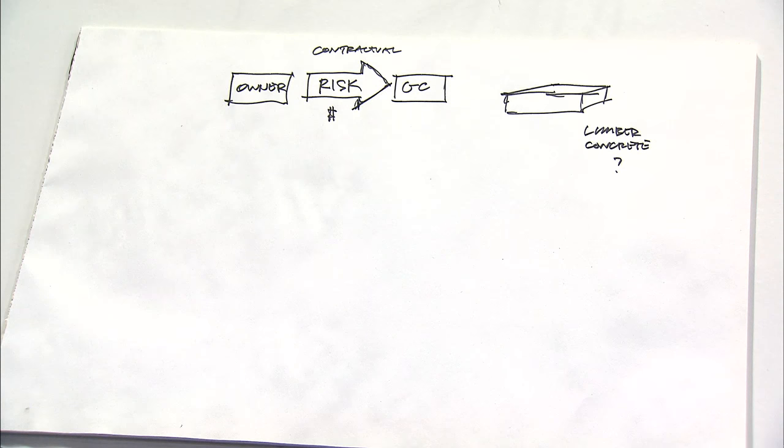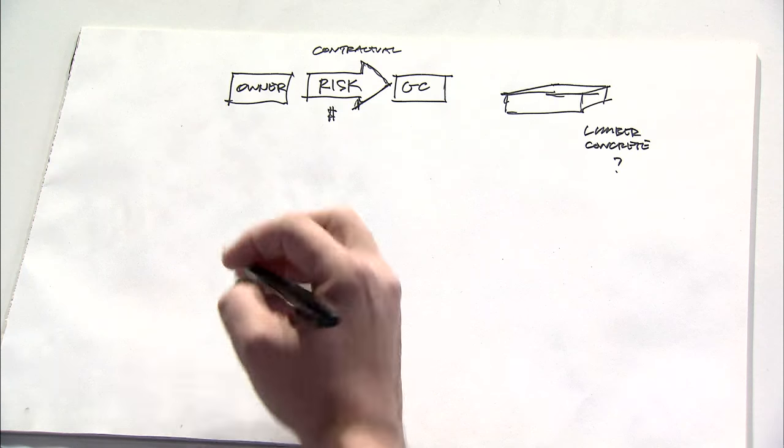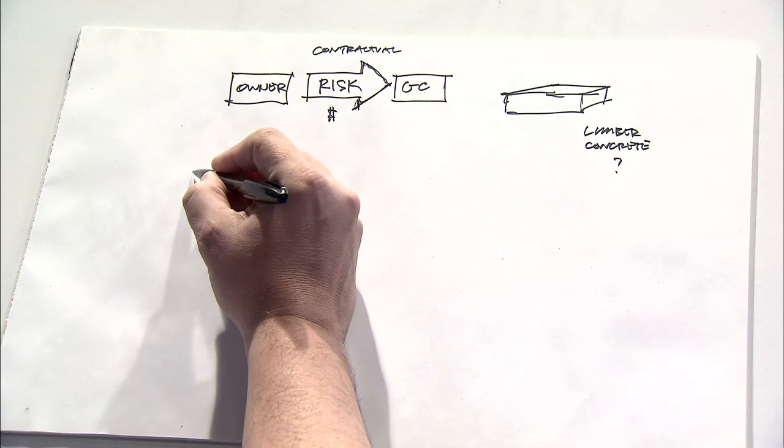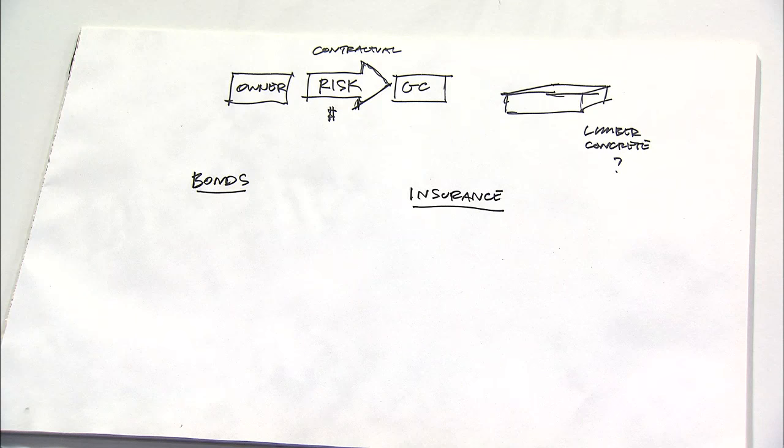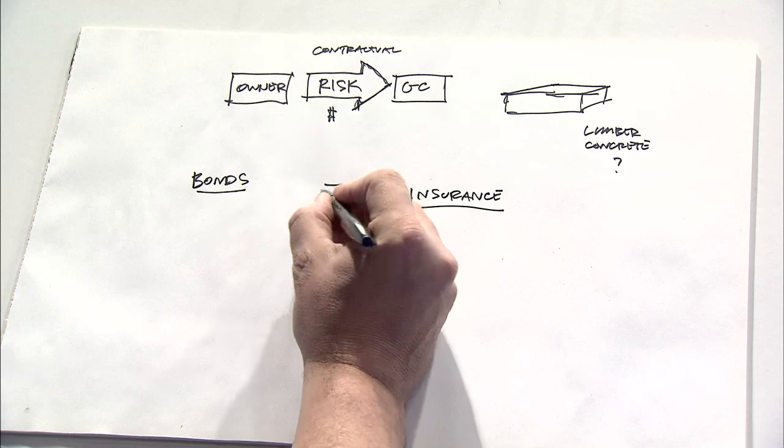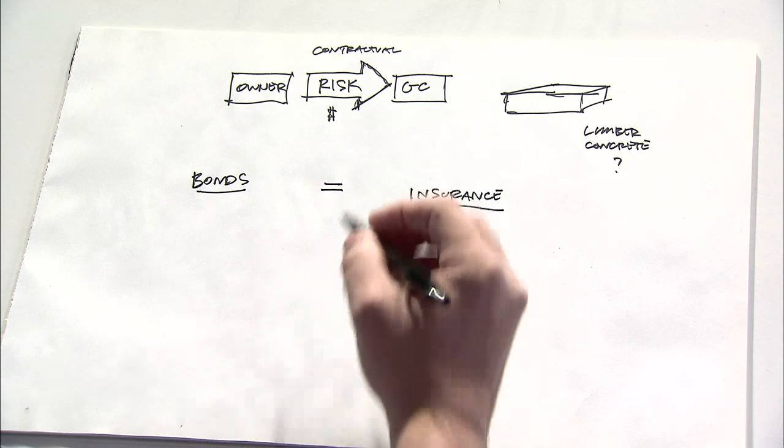And within all this transfer of risk, there are things that parties do to mitigate that risk. Many times, this takes the form of either a bond or through insurance. Bonds and insurance, in many ways, are similar with things that are common between them. On the other hand, there are things fundamentally that are very different.